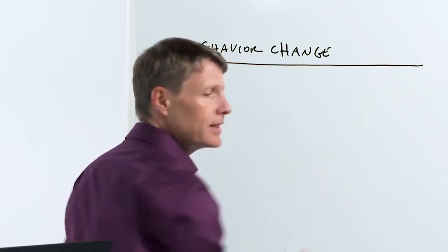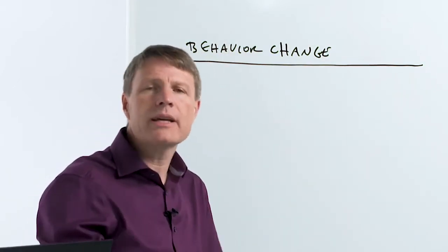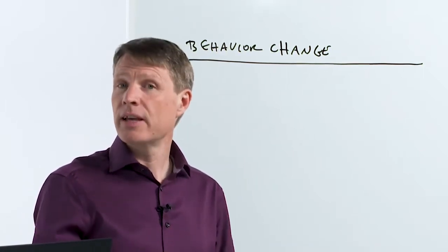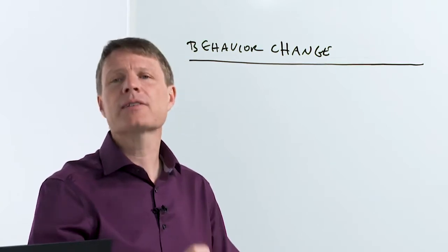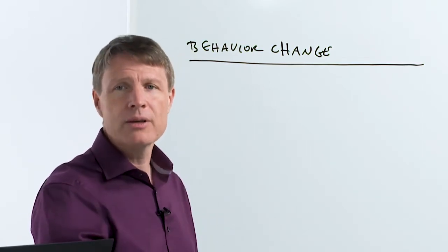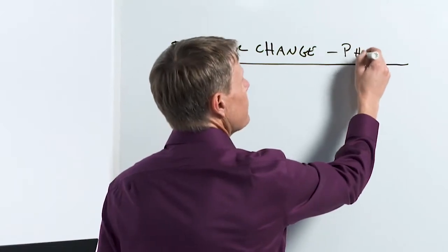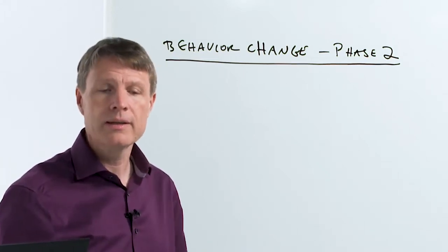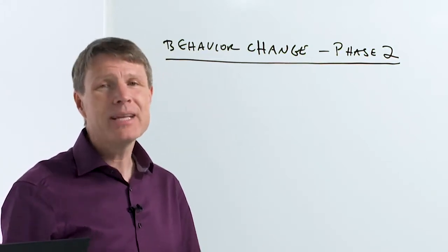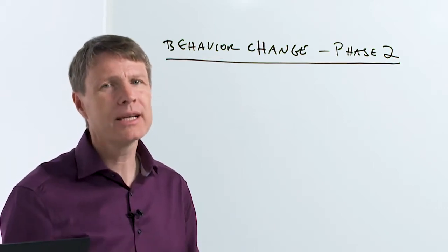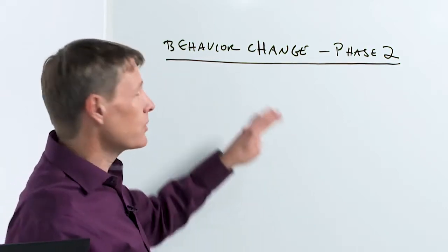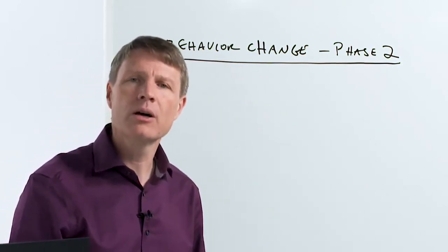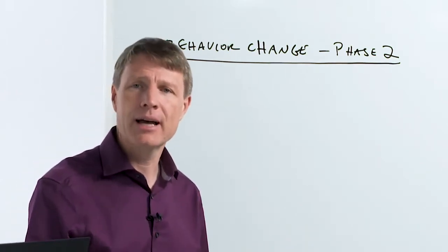Now we have to think about this in the context of a project plan with actual time in it. And for them, they have multiple phases, and this is a phase 2 thing. They've got the thing defined, and now they're testing it, developing it, and proving it out. So this for them is a phase 2 issue. So you think about where your proof points might go with respect to your project plan. Sometimes proof points belong in many phases, but basically pick one where you're really going to learn the most information. So once you're clear about where it sits in the project plan, you want to define the question, how would you actually know in the context of that plan and timeline?